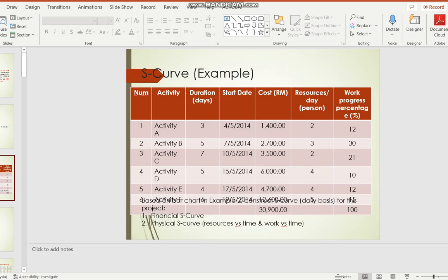Just go for the layer 1 activity in your work breakdown analysis, or it can be part of your BQ. So there's two components. One, the contractor will keep one based on their own costs, because these are the costs of doing the work, not including profit. Then there's the part you will be communicating with the client, and that will be based on the budget that both of you have approved. And that will be a contract between the two of you.